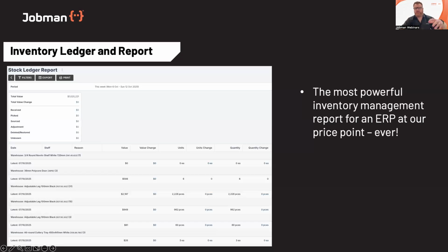And a big part of that, of course, is taking your costing, allowing you to set your overhead, wastage, and margins, profit margins, sorry, and then seeing the final result. And the continuous level of improvement to that is that you can go through at any point throughout the year and look at your job cost reports and go, oh, yeah, cool. As of today, all our jobs are up to X. We estimated this job was 100 grand. And so far, we've spent 40 grand on materials and 20 grand on labor. Assuming this job is just about done, we should make 20 or 30K.